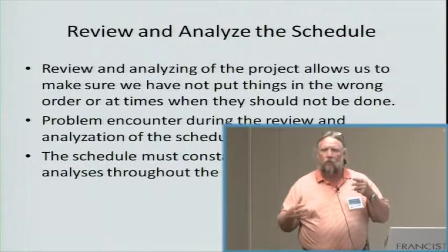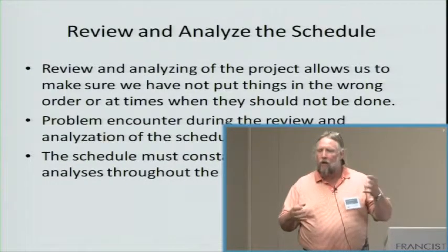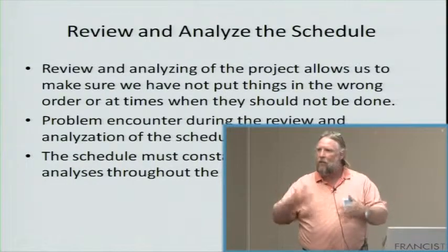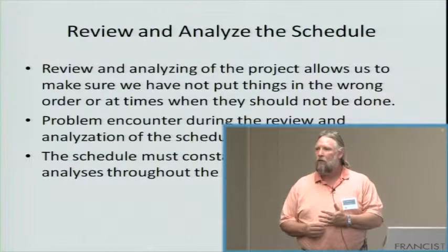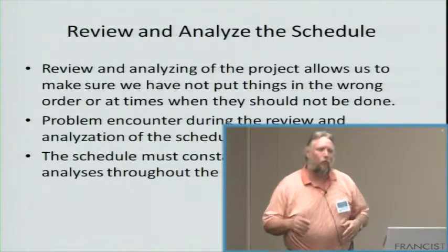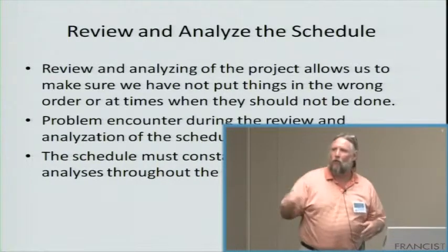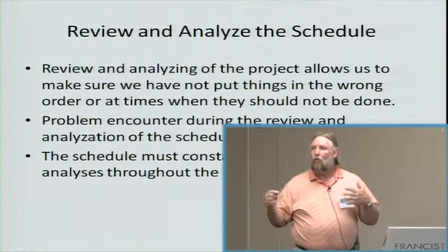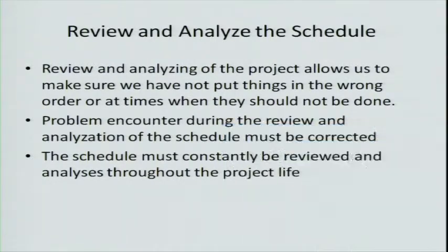Is the sequence that we want to use correct for all items, or do we want to do something different? Do we see things that are doubling up on themselves? Do we have logic problems where we have the same thing going over and over and over again because we forgot that something had to happen before we could do that? So there's a logic loop in it. Okay?